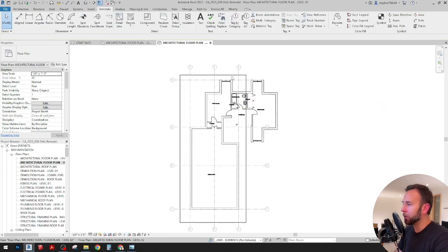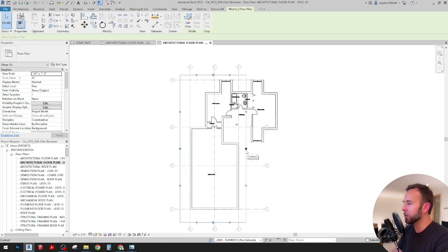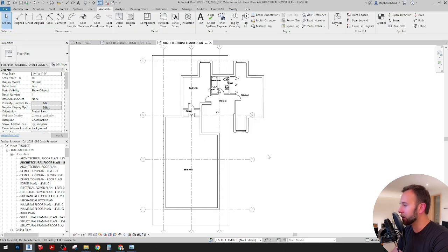So if you are putting a scope of work together for contract purposes, just remember to include, there's going to be unforeseen conditions with remodels all the time, always. No two buildings are alike, especially in terms of residential. So just to protect yourself, that's always a good idea.